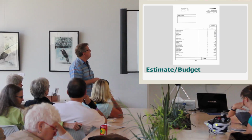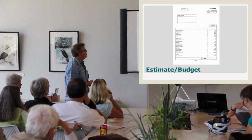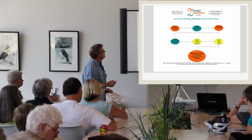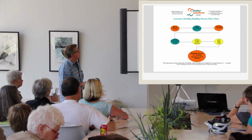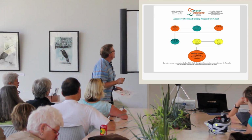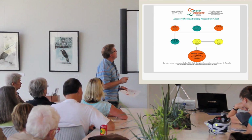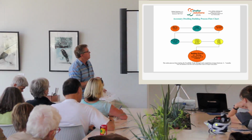Now I'll back up. Back to the flow chart. There we go. So, feasibility study is completed. Then, if we get to this point and you're ready to go with your contractor or with me to sign a building contract, then those plans are finished up, engineering's added to them, more details are added, and all the applications are filled out. And you, or the builder, applies for the building permit. Well, first of all, to put that stuff together is about 3 weeks from preliminary plan to final plan and applying for the building permit.